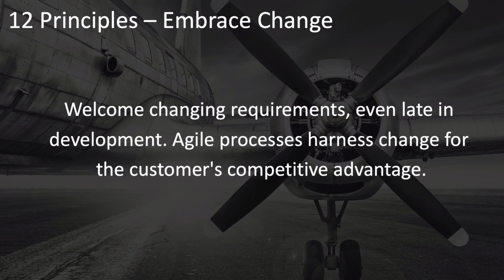The next principle is welcome changing requirements, even late in development. Agile processes harness change for the customer's competitive advantage. I call this embrace change. In a traditional predictive project, change is something to be avoided because it causes variances and deviations from the plan. And you put in all kinds of change control to minimize change and control it tightly, but with the assumption that there shouldn't be much change.